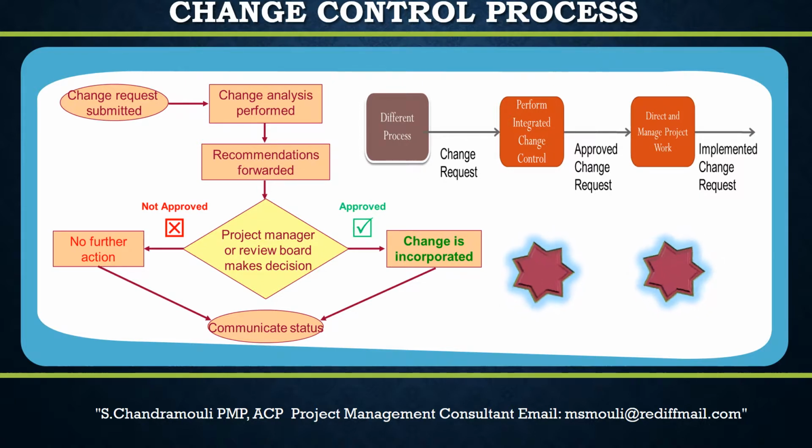The project manager needs to focus on not only managing the changes, but proactively eliminating the need for changes. Steps to be followed if a change is requested by a customer. Number 1. Evaluate and assess the change. How is the change going to impact the project?